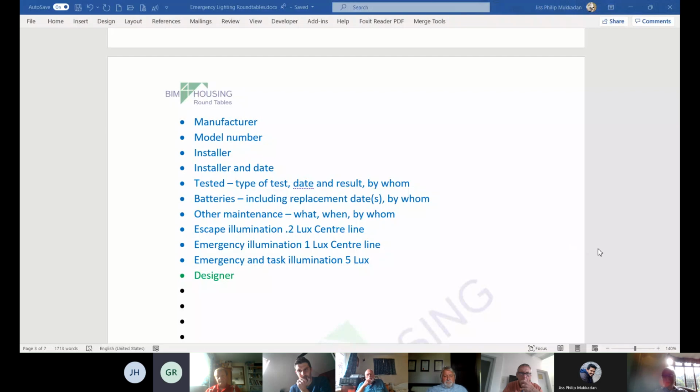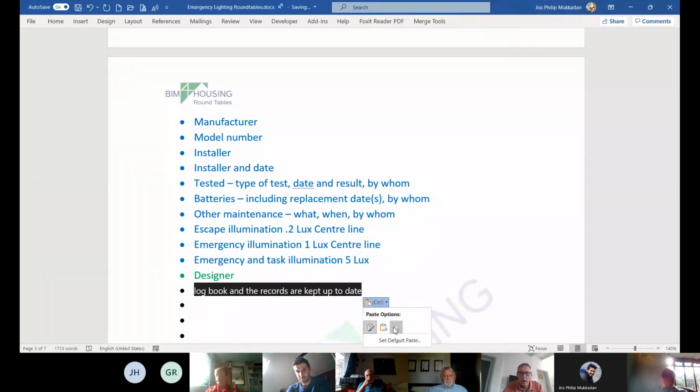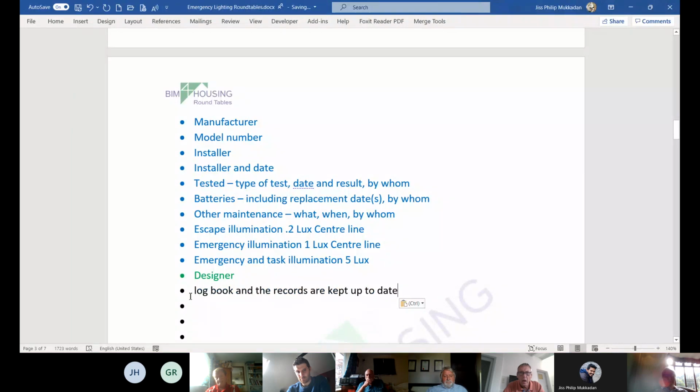Just to clarify, for each individual product, you need to know the circuit it's installed on, why it was changed from the design before, whether stuff has been superseded, whether it's gone through the same test regime as the previous ones. So electrical circuit identifier. Agreed. All the components would need to be identified for change.